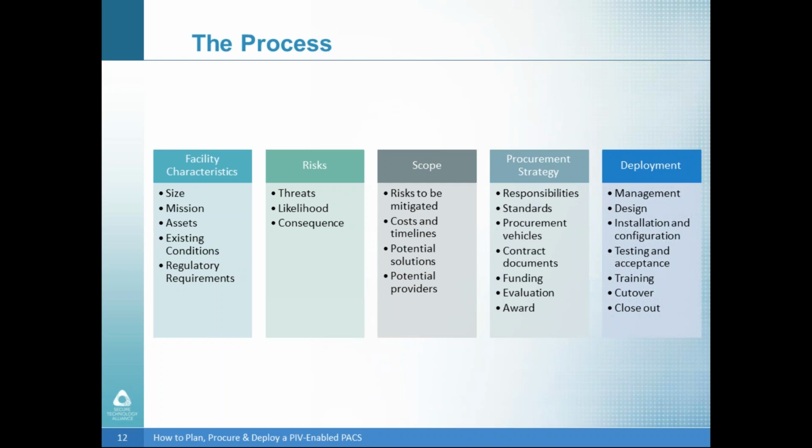Scope development is where the information from the facility characterization and the risk assessment come together to provide information senior leadership needs to make the types of trade-off decisions I mentioned earlier. The scope of your project will become clear as decisions about what risks to mitigate or accept are made and what resources you'll have available to you.